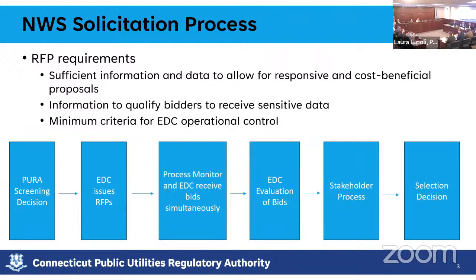So I'll start off, and then Mr. Freeman can chime in. Let's start with a very large project, referring back to the IDSP docket. These get tracked on our side in the step load tracking. If the customer communicates with us early on and ahead of time, these step loads end up in the company's forecast, and the company can accommodate that on the capacity side. So technically, by the time the project's there, there should not be any issues in terms of capacity if that has been clearly communicated ahead of time.